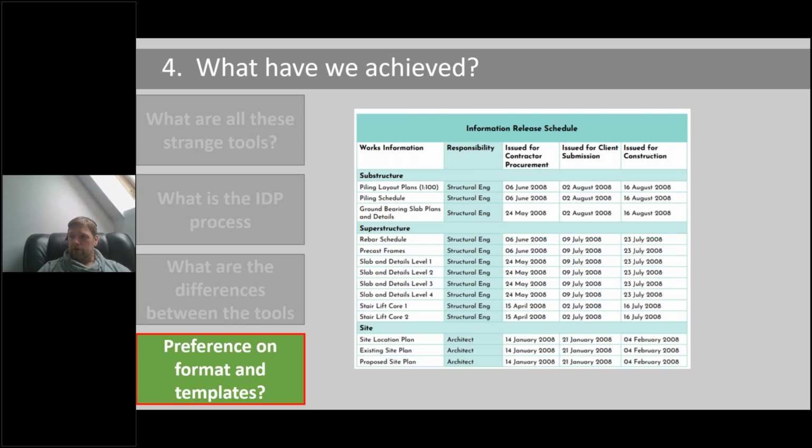The fact that the architect needs to maybe split that out into several schedules to make it easier to read, because maybe we've asked for a lot of data in there. Same with floor plans. Sometimes, with large buildings or linear assets, you can't just get it all on one drawing. You've got to split it maybe over 4 sheets, and trying to plan that very early on is quite difficult.